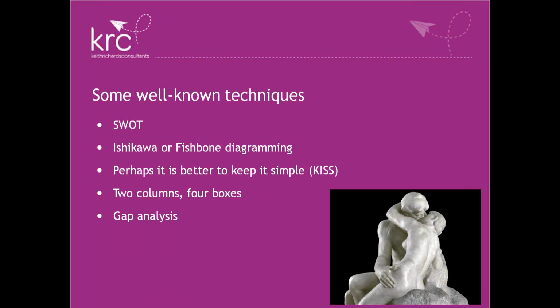Gap analysis I use quite a lot, which is really just 3 pieces of paper. The first piece of paper is where we are. The third piece of paper, if you like, is where we're trying to get to, and the piece of paper in the middle is your action plan. What have we got to do to get from the first page to the third page? And it's really simple. As long as you don't combine those steps, it's a very simple way of getting people to move forwards. So I would strongly recommend that you just keep these things simple.